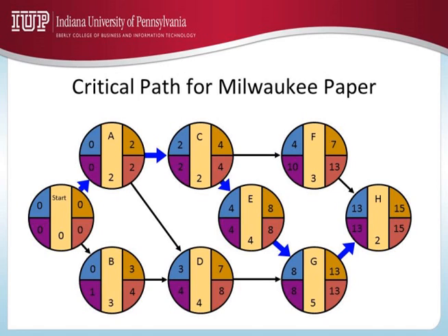The latest start time is 10. Instead of taking 3 weeks, if I take 8 weeks for F, will that be a problem? Most likely not, because if I take 8 weeks, I can still start at 4, be done at 12, and the latest finish time is 13. Get the point? So there is a lot of flexibility here for F.